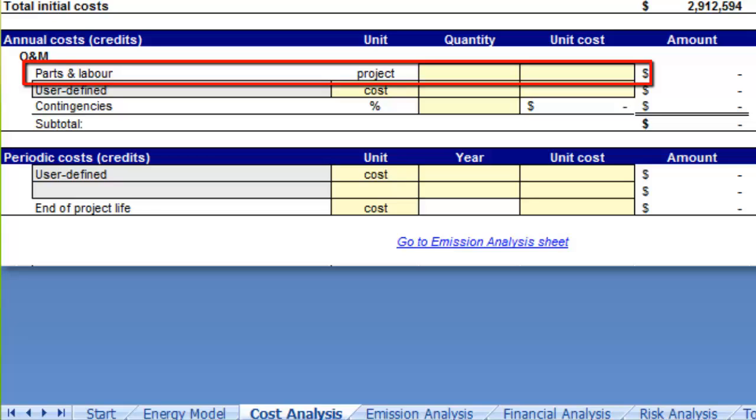For hydro projects in North America, the cost of labor can range between $40,000 and $80,000 per person year in 2010. The number of person years of labor can range from 0.2 to 1.0 and will depend on the degree of automation built into the hydro plant.